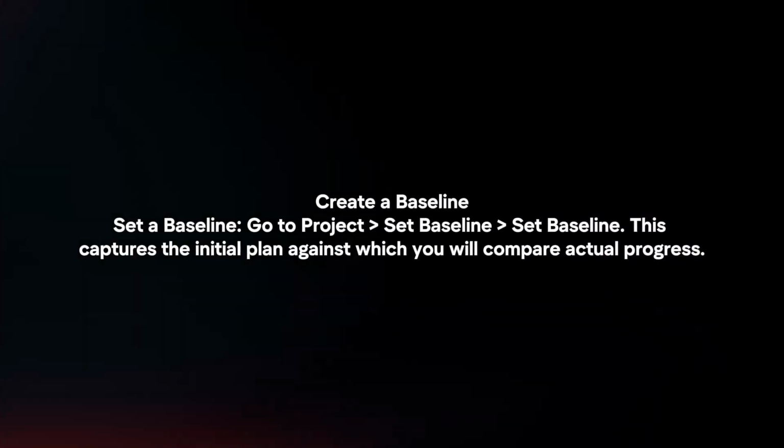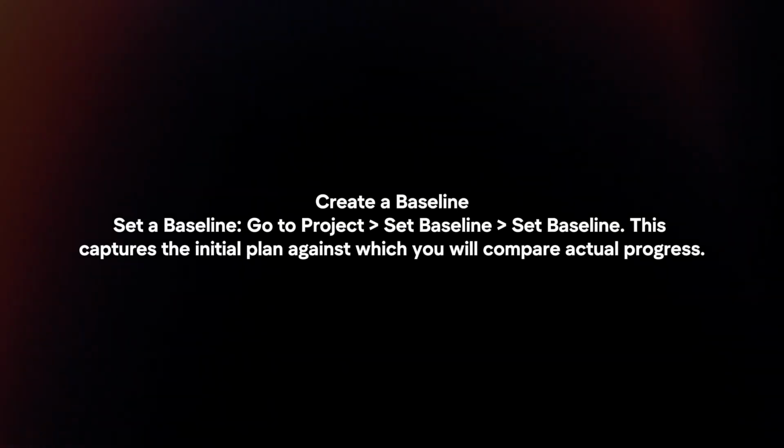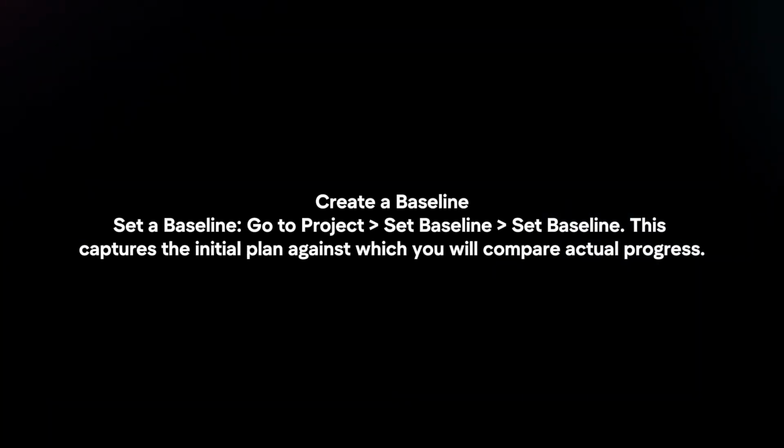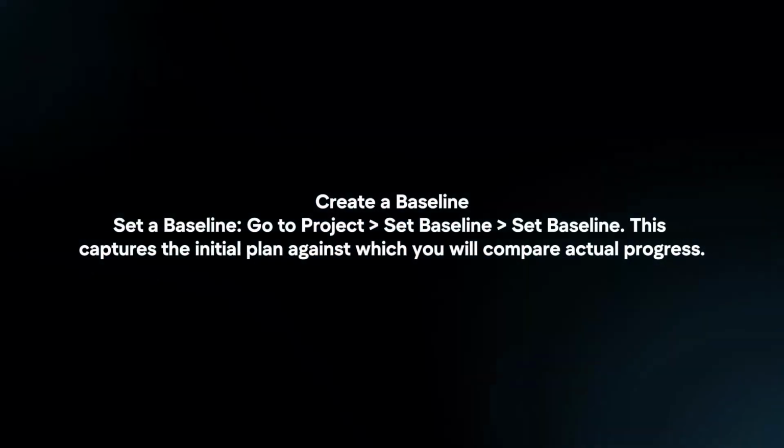Create a baseline. Set a baseline. Go to Project, Set Baseline, Set Baseline. This captures the initial plan against which you will compare actual progress.